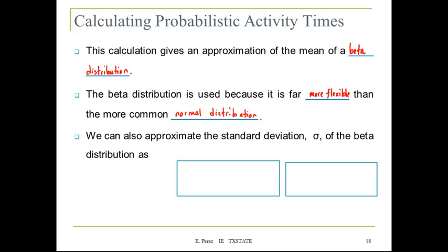But we're going to use both actually. We're going to start with the beta, and we're going to estimate the expectation using the beta distribution. But then we're going to have to use the information that we have, which is going to be a list of expected values and a list of variances, to find a probability. So at that point, since we are dealing with the expected values of multiple data points, we're going to use the normal. Okay? So I don't want you to get confused.